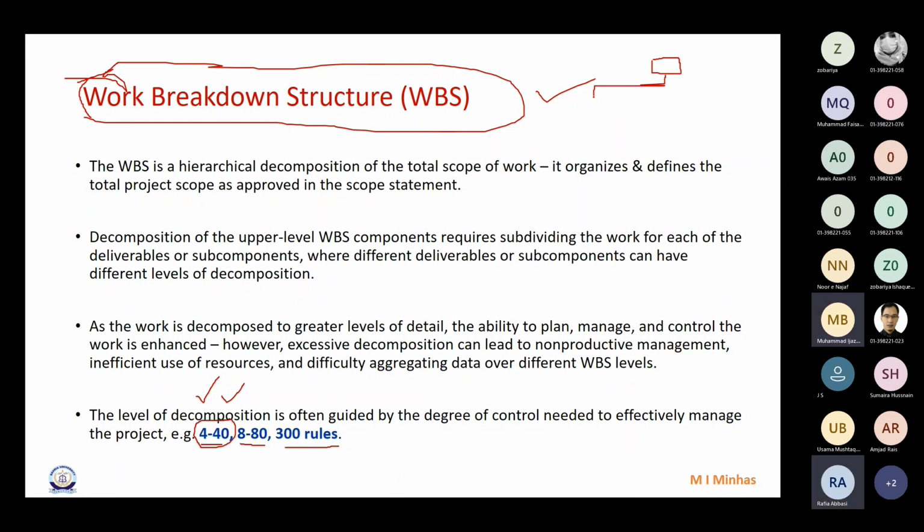Good. In WBS, please remember, when we create the WBS, activities are not part of the WBS. No, activities are not part of the WBS, right? Please remember that. The lowest level of the WBS is work packages.